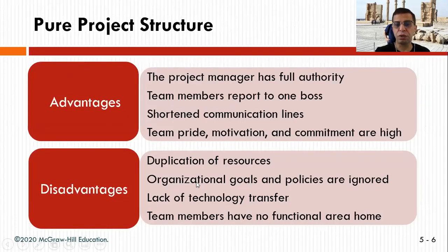Now, the pure project's advantage is that the project manager has full authority because it's like a group and he's in charge. They don't look outside. The team members report to one boss, which shortens the communication line as usual, and team pride, motivation, and commitment are very high to deliver these things, because they're clearly part of the team.